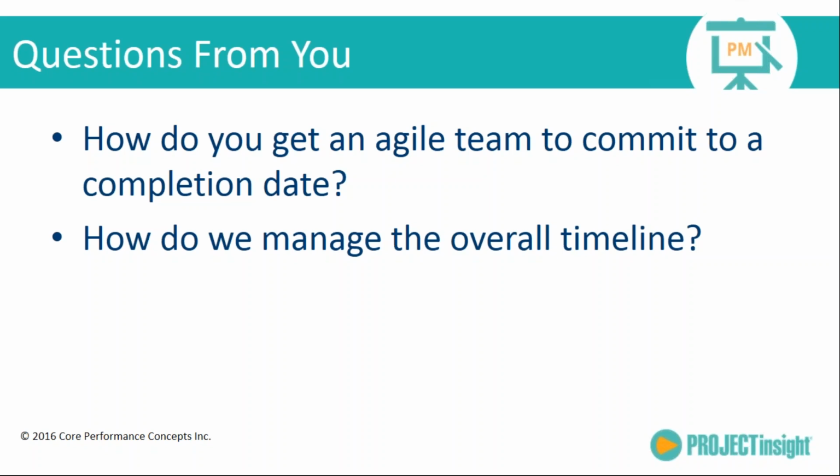So if you've got a budget that says this has to be done in about 5 months, then you've got to plan your project to where it's broken up into major chunks and do some sprints within those major chunks for those deliverables, and be able to escalate when things seem unrealistically delayed.